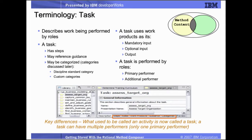What used to be called an activity in RUP Process Workbench and RUP Builder is now a task in RMC. To provide a tighter link to process enactment and project management, we renamed the lowest assignable units of work to task, as this is the term most commonly used. A task is an atomic description of work that can be resourced and scheduled to role instances, with inputs and outputs. It directly maps to Microsoft Project, RPM Office tasks, Webster Business Integration tasks, and so forth. A task has a role assigned as a primary performer and optionally as an additional performer.